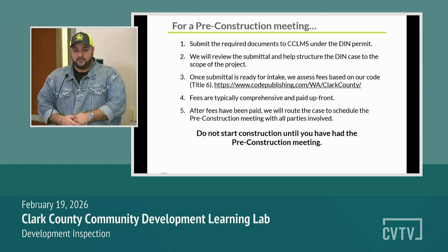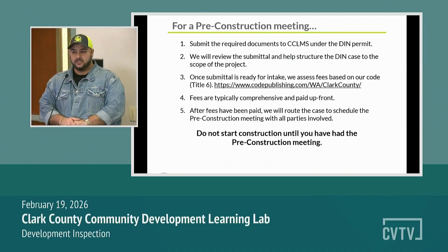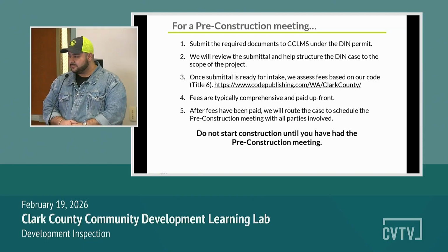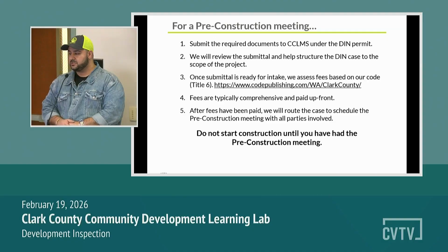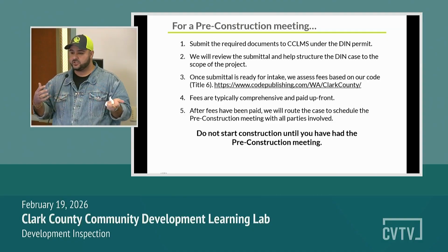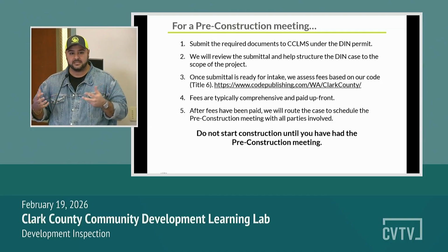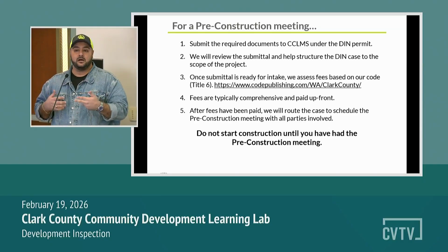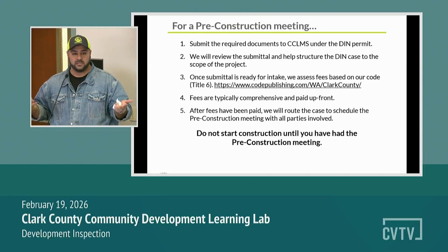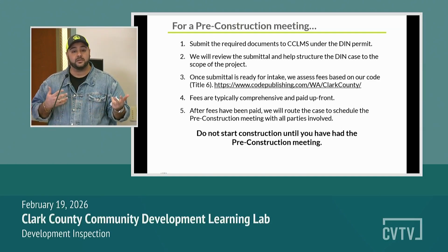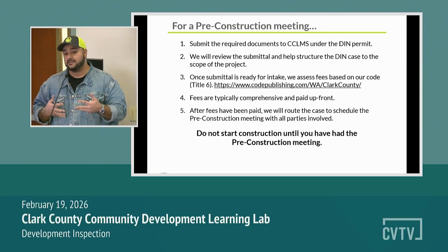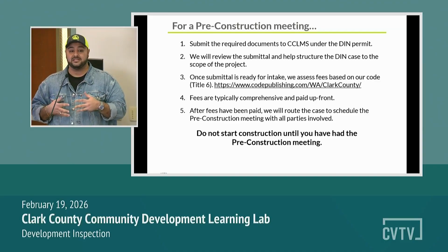When you have your development inspection case, we have reviewed it and submitted all the requirement documents to the LMS system. We will review, myself and the team, will review all the submittals and help structure the case for the scope of the project. And what I mean by this is sometimes we have a larger subdivision that does come in. It's not all necessarily going to be done all 100 or 200 lots of it. So we need to make sure what parts of it are being phased, what parts of it are being done at this time, which part are we inspecting.